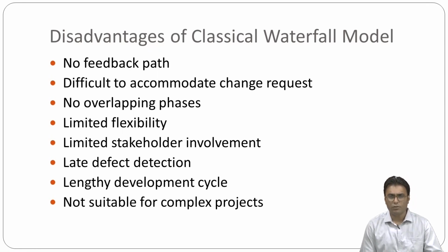So in the waterfall model, testing is typically done towards the end of the development process. So this means that defects may not be discovered until late in the development process, which can be expensive and time consuming to fix actually.